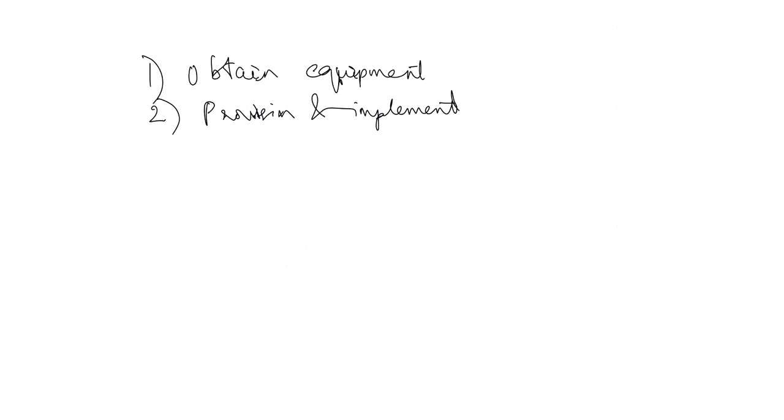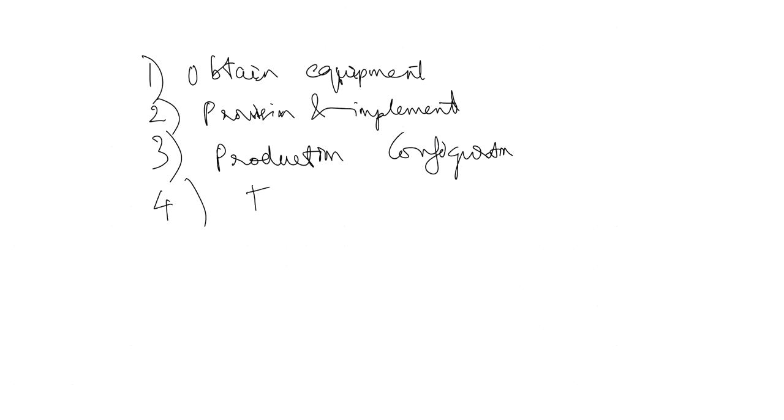So now, the next stage of the major task is testing the mission, right? So you have to make sure you test your equipment. So here, production configuration, right? And then testing. So again, this is high level. You are breaking down again underneath, right? In the testing, you have to ensure your network connectivity, as well as the functionality of web and database, are set properly within the span of a certain duration. So again, each phase you have to understand how many days it might take, right?